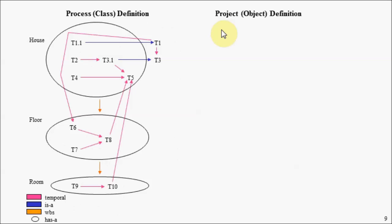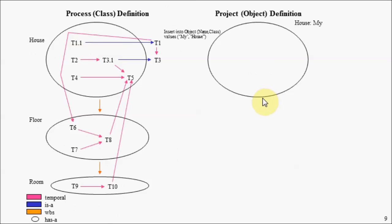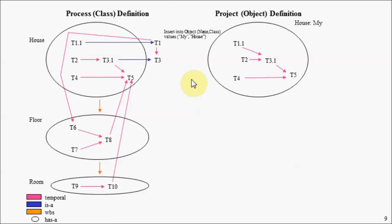Let's assume we would like to create a project plan by instantiating our process definition. We first instantiate our house entity, calling this instance 'my house' — name 'my' of type 'house'. What TCSQL will do behind the scenes is instantiate all of the tasks that define our house entity. Notice that what appears in the instance is slightly different from the template because in our template we had a temporal relationship between general tasks. When we instantiated this entity, TCSQL was smart enough to inherit that behavior, so now we have a temporal relationship between task T1.1 and task T3.1.